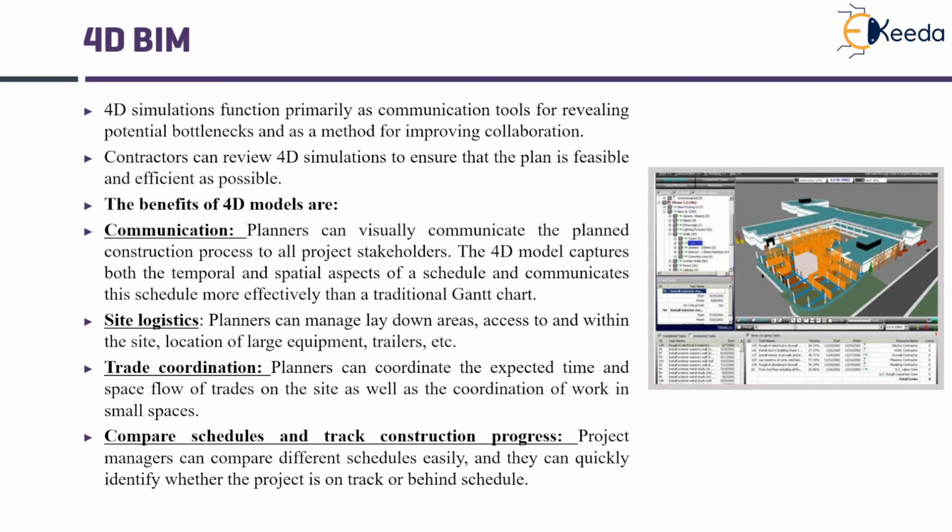It also helps in trade coordination, so that the expected time and space flow of trades on the site can be easily visualized. Comparing schedules of the tracked construction project and the baseline construction project gives a quick idea to see which activities are lagging behind.